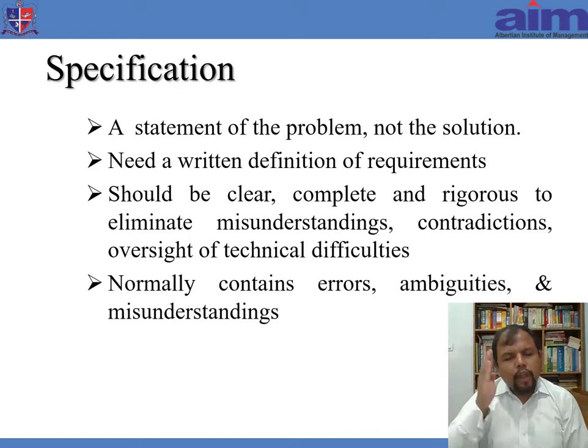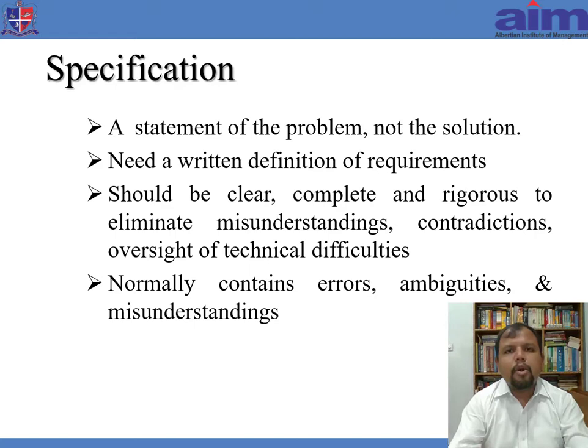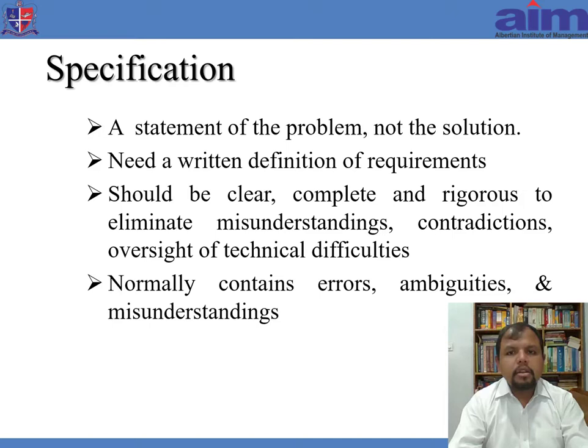For any project, there is a problem and the solution is the outcome of that project. So as a project team, the first job is understanding the problem. In specification, the very first step is to create a statement of the problem — not the solution. Once you have the statement of the problem, you can sit with the client and understand what the requirements are. It has to be clear, complete, and should eliminate any kind of contradictions and misunderstandings.